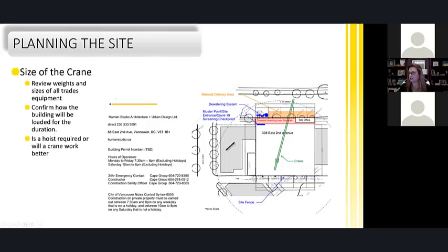On the project, we initially thought we were going to put our dewatering system in here. We actually moved it into the back to get it out of our way, and found another way to run the water down alongside of this building and out. That frees up our entire space, so we can now have a full thoroughfare of our trucking coming in and out.